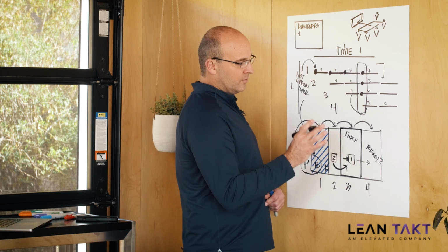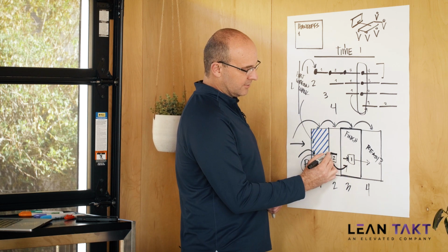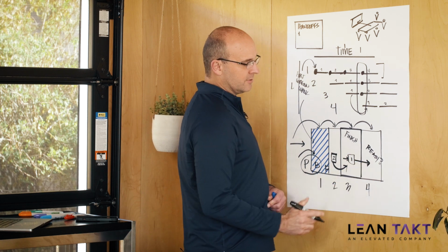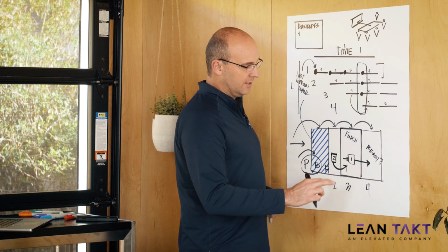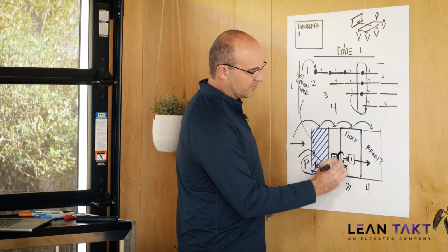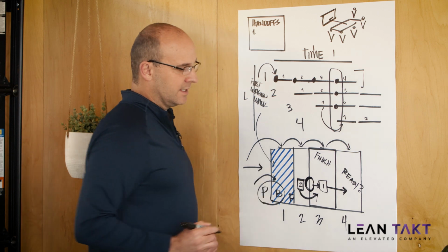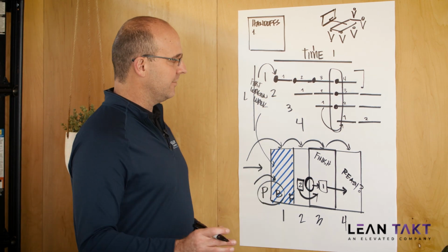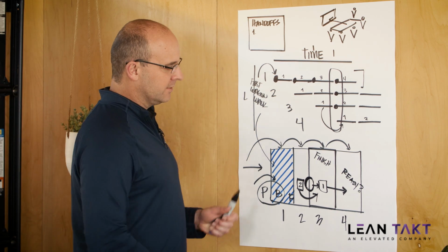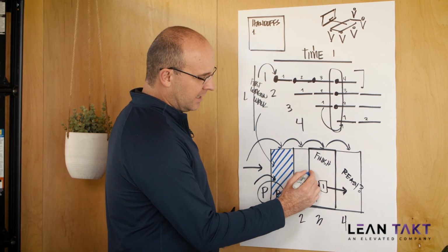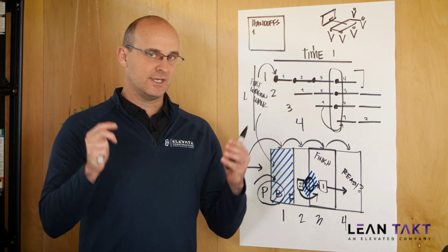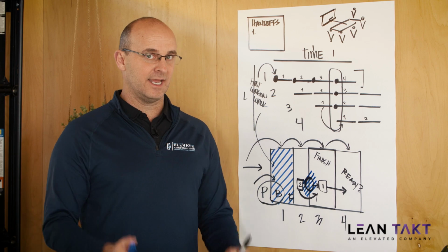This is how with the TAKT production system we're really able to encourage pull, because we're pulling people in, and the way that we pull is verifying, is the next area ready? Are you finished? And will you be able to manage this handoff properly so that the other trade can come in unobstructed? This is key. And so this is called a handoff walk. So when these happen, you will literally go out there and manage with the trade partners, with the foreman, that handoff so that it can be successful and so you can have flow.